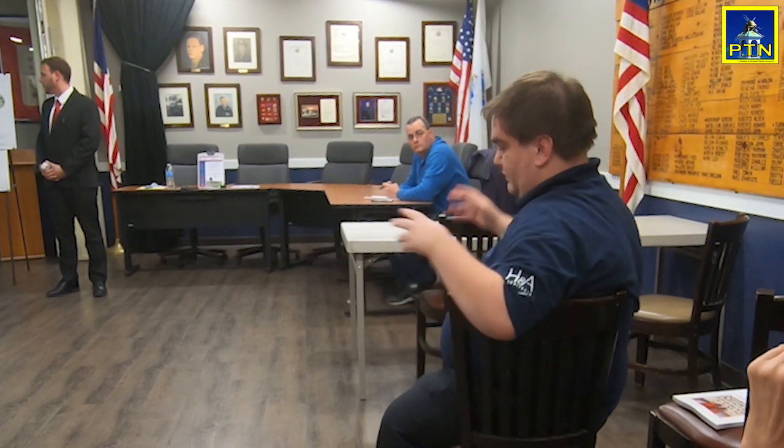Mostly the cases are around the bricks unleveling themselves. I do sympathize, I actually just made my own patio, and it unlevels all the time. Normally, when a constructor knows it is an ADA compliant system, there is an underground, lower level piece essentially under the bricks that they can lay to stabilize that piece. So I just wanted to address that for concerns too, because that's obviously a concern when you're working with ADA. Yes, sir.